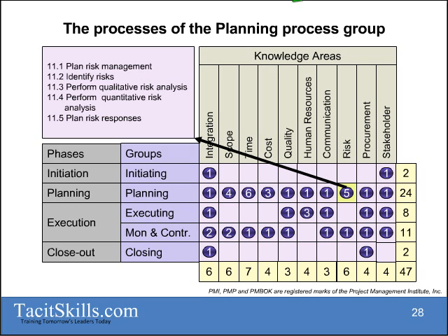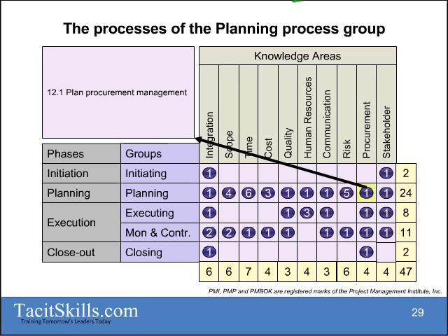After that, I also need to determine what my procurement management plan is all about. In other words, how am I going to procure? How am I going to make or buy decisions? What type of contracts am I going to use? Any contract clauses that need to be in? Am I going to have a contracting person on my project, or are we going to use a contracting or a legal department? All those things need to be sorted out.